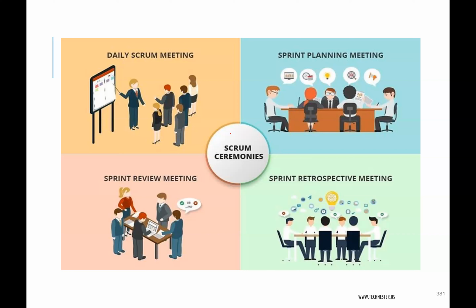So everybody shares their feelings and thoughts and ideas and suggestions for how to correct whatever problems they have. And the Scrum Master is supposed to take note of all these issues and all the solutions proposed and make sure at least one of them is implemented in the next sprint.